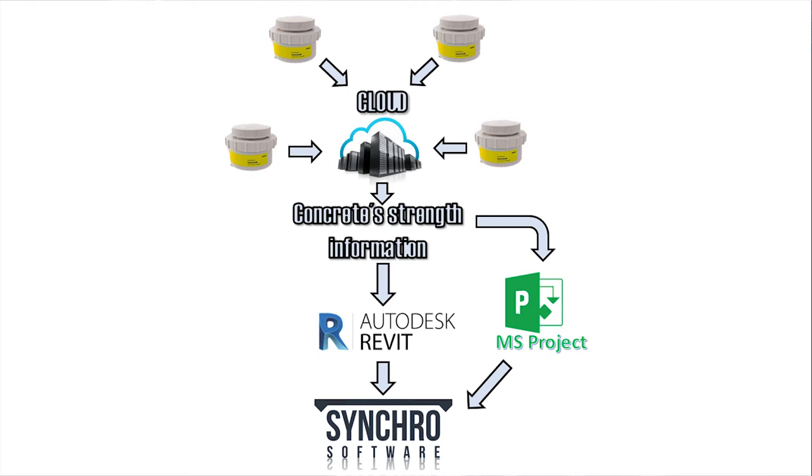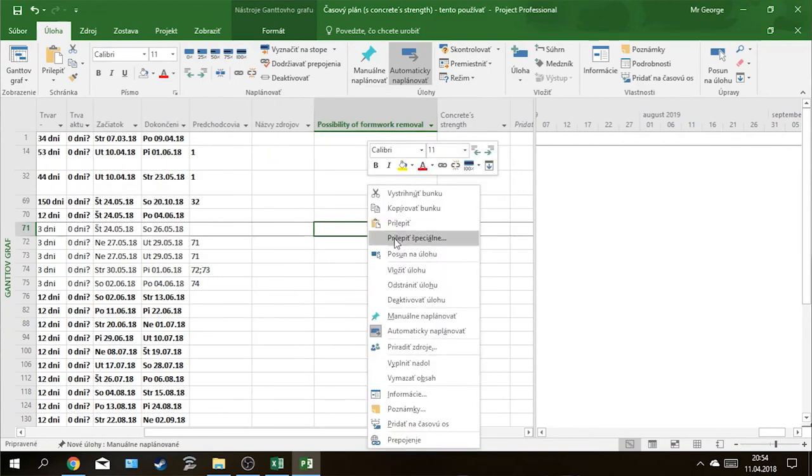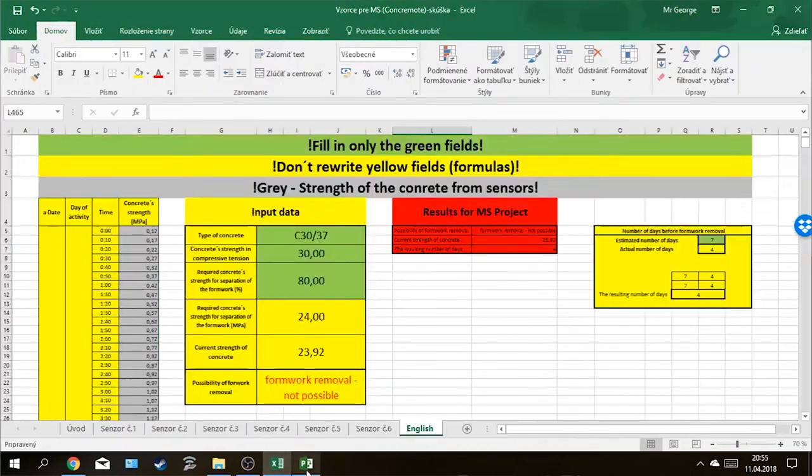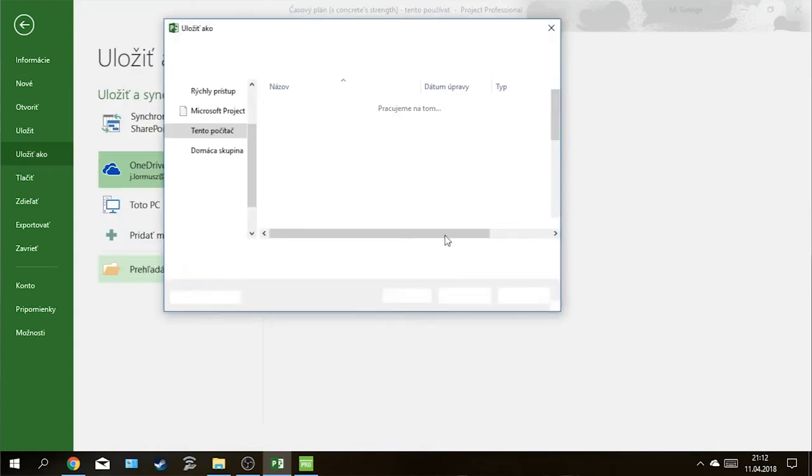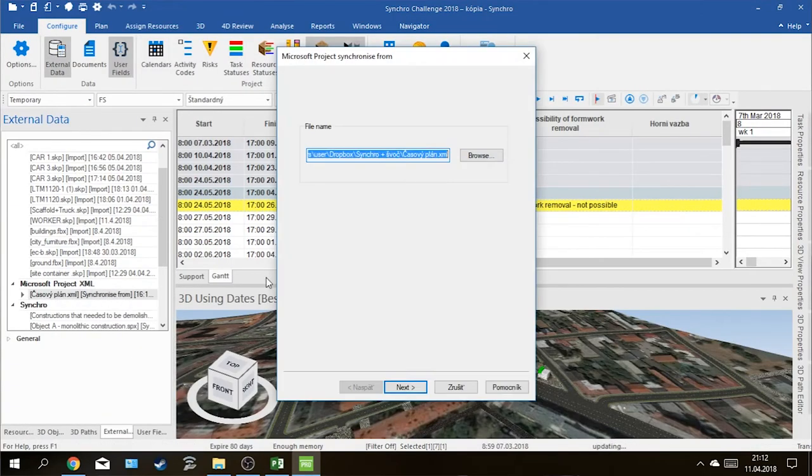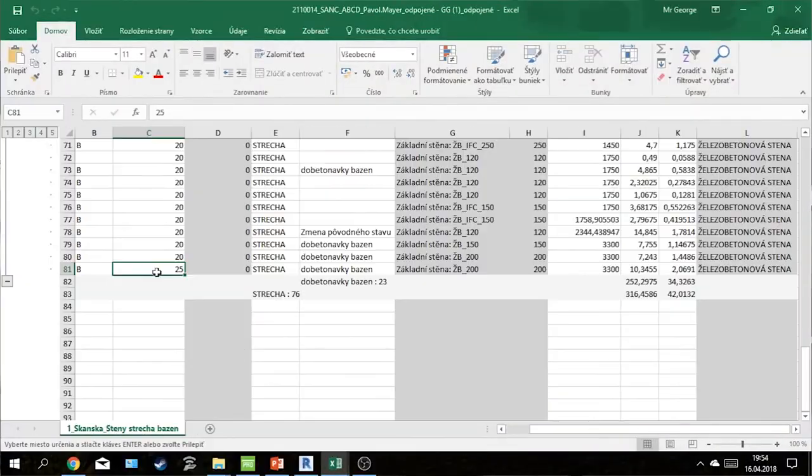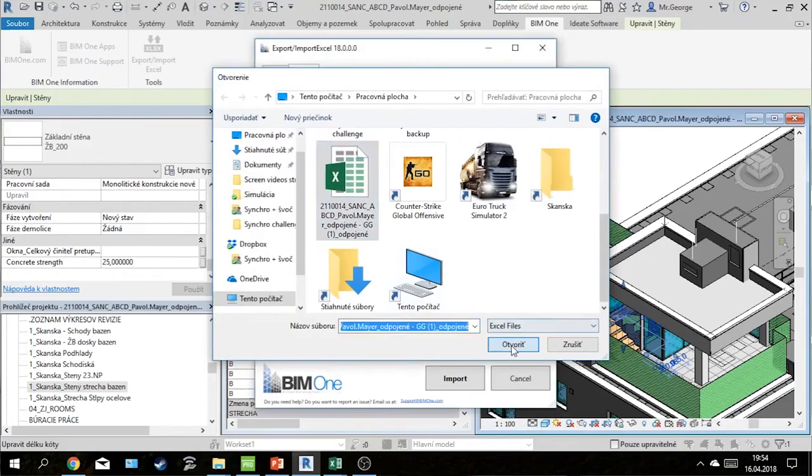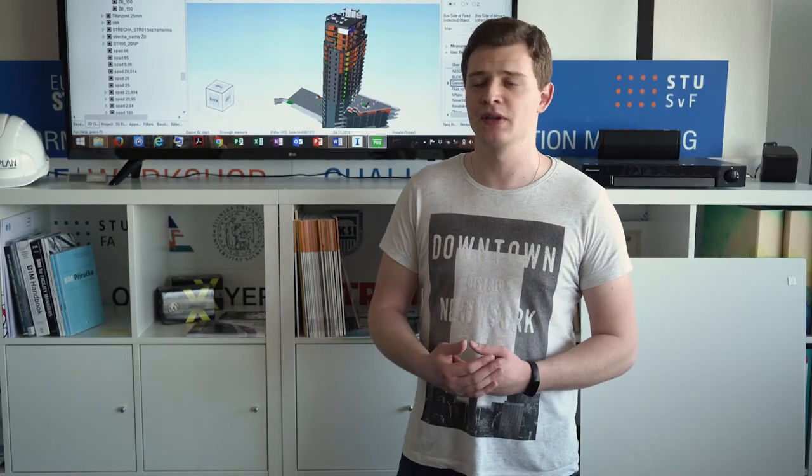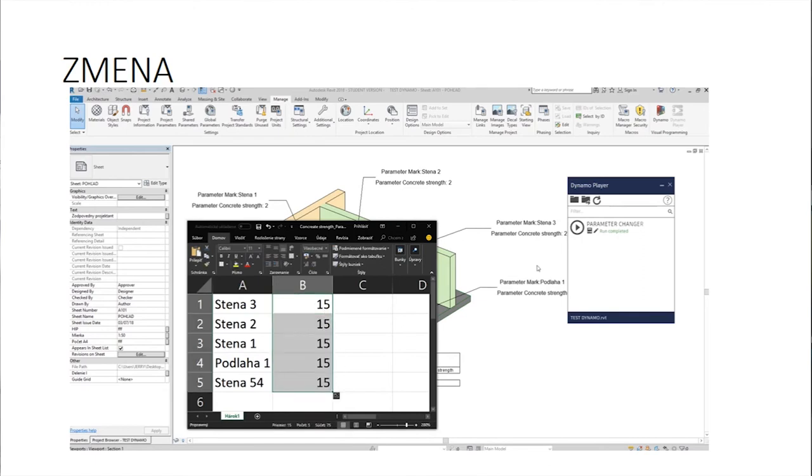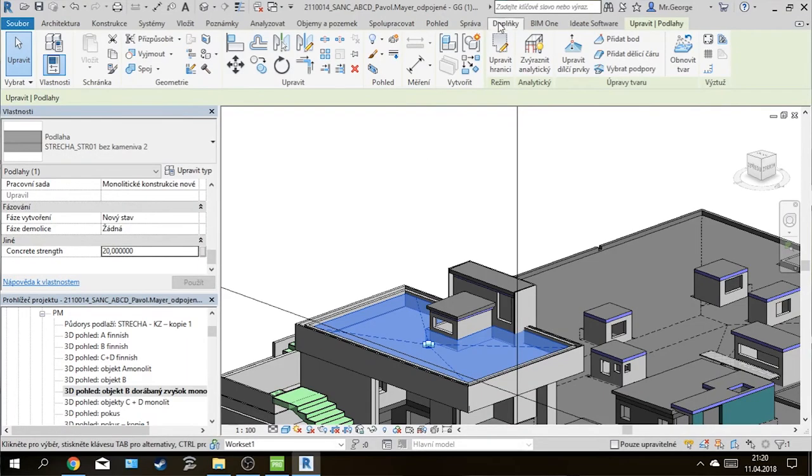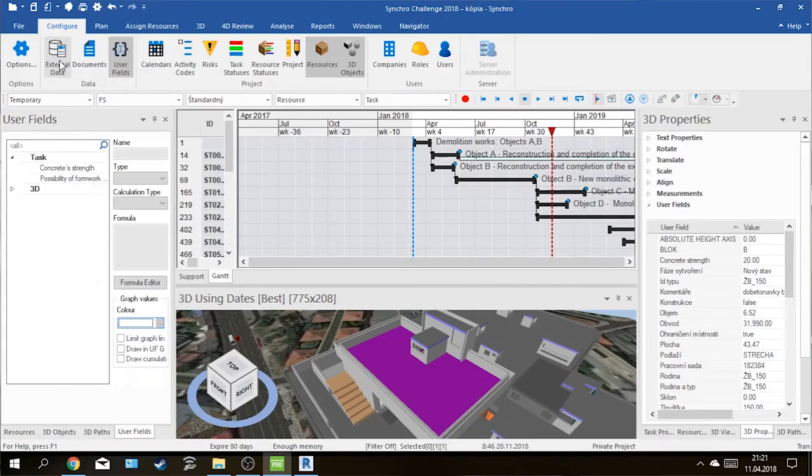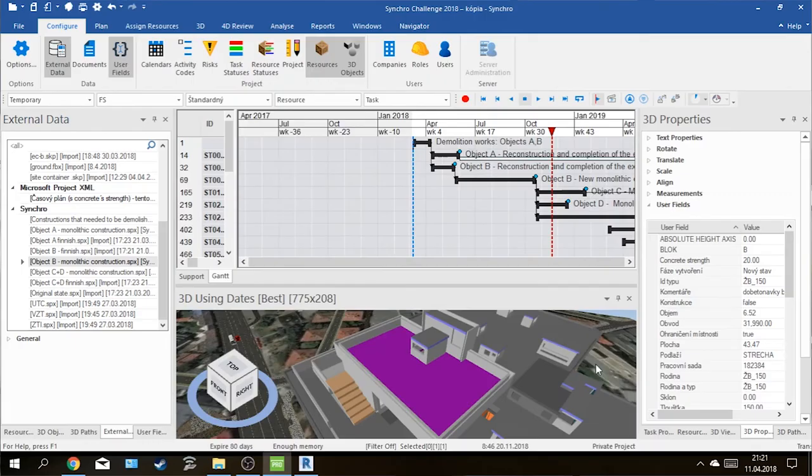The sensor server collects the information in an Excel spreadsheet. For the method where we modified the schedule, we connected Excel with MS Project. After synchronizing, it appeared also in our 4D model. The method based on modifying the 3D model through native format is the platform where the information about real-time concrete strength is delivered directly into the 3D model using an Excel predefined template or Dynamo script. From this point, it's really easy to export this model. Then after import or synchronize our model, we have live information about real-time concrete strength in our Synchro simulation.